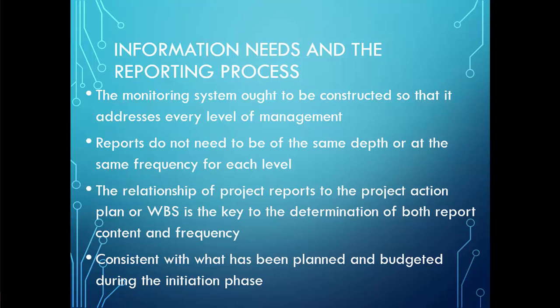The timing of the report should generally correspond to the timing of the project milestones. The frequency of reporting should be enough to allow control to be exerted during or before the period which the task is scheduled for completion. The nature of the monitoring system should be consistent with the logic of the planning, budgeting, and scheduling system.